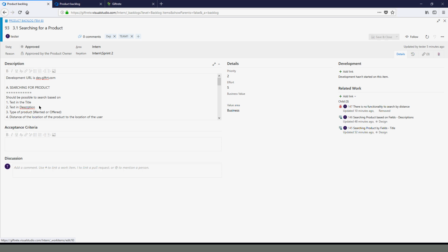Or they can say, based on the new information we have, let's do another round of poker. Then everybody does another one, until the team agrees. So that's what happens in a grooming session like that.